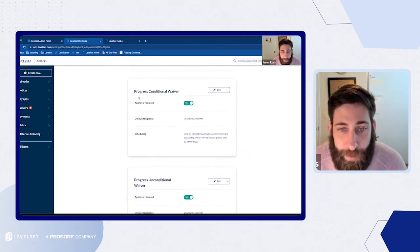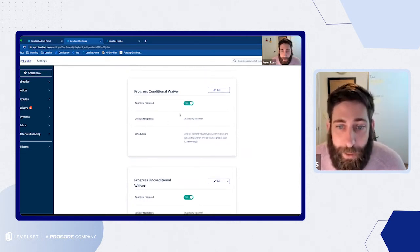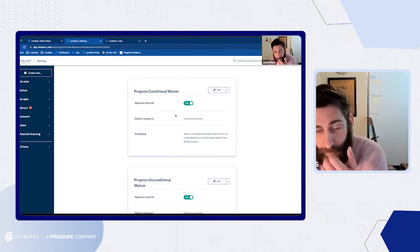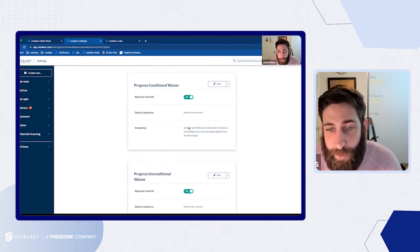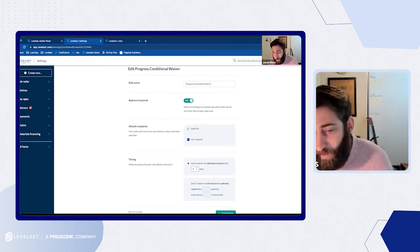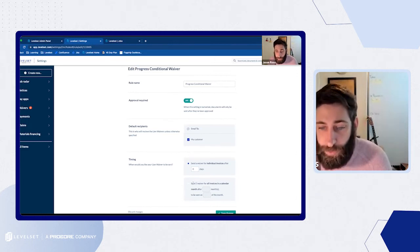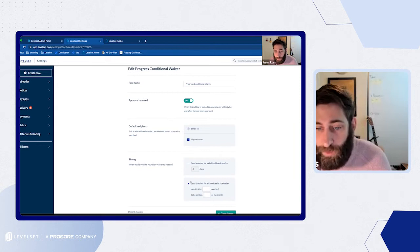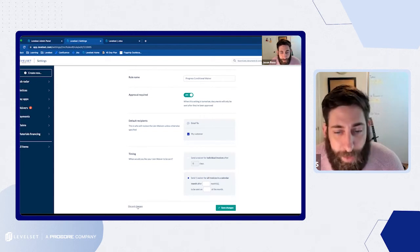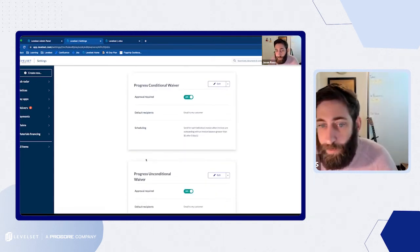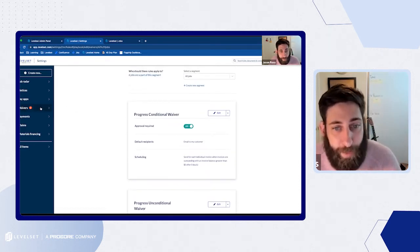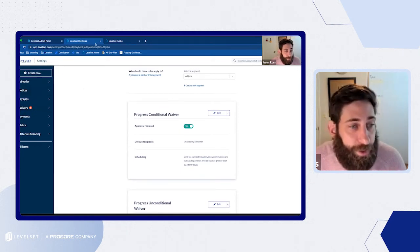Looking at our waivers — they're called a playbook. You can determine who the rule should apply to: all your jobs, or specific customers or specific job segments. You can configure your progress conditional and unconditional or final waivers, and set whether you want to approve them — meaning you want to put eyes on each one before it goes out — who it's going to go to, and the timing for when those are going to go out. You can say send it after one day or after ten days, group them into a single waiver for multiple invoices in the calendar month, and determine who you're going to email them to. That is a quick run-through of how you would configure an automation rule.